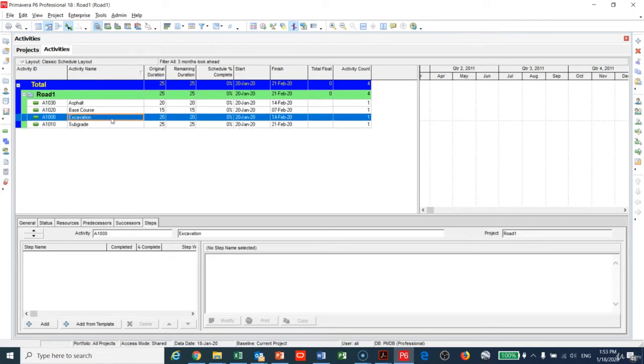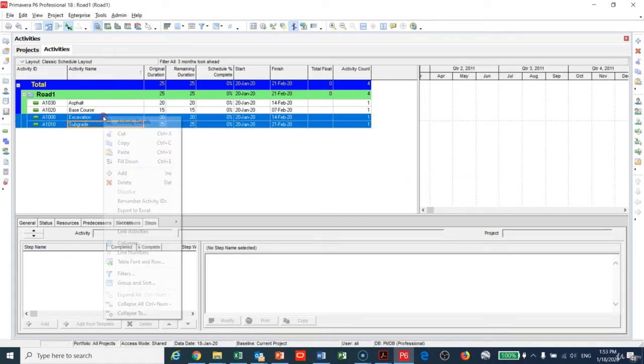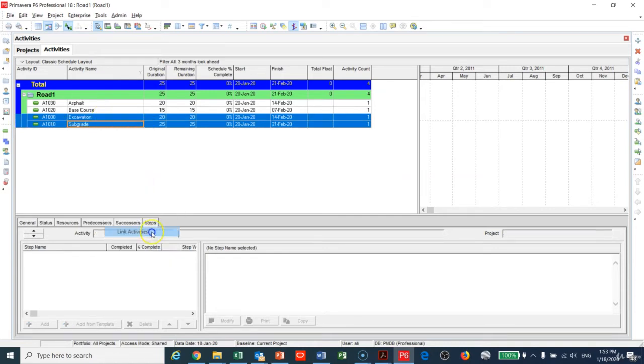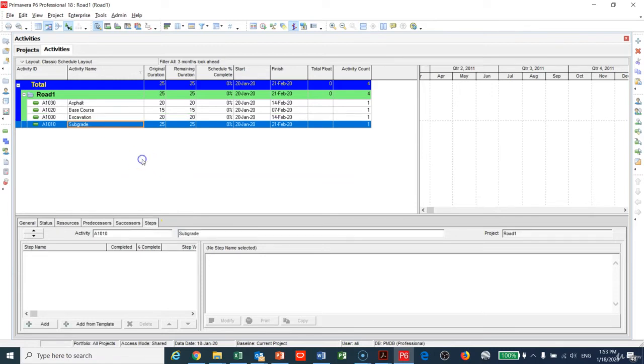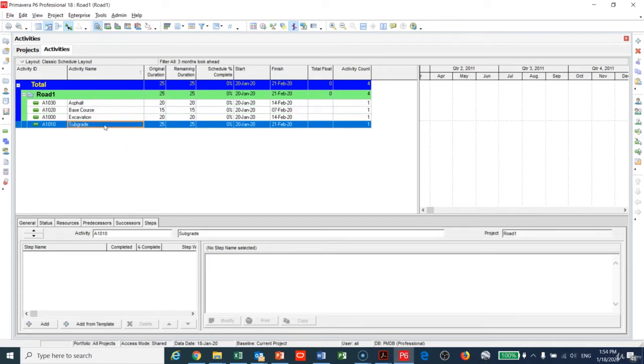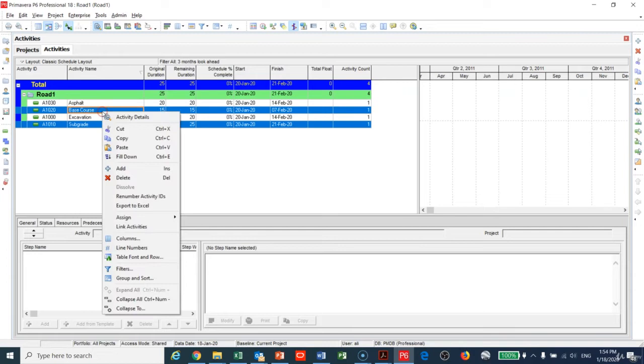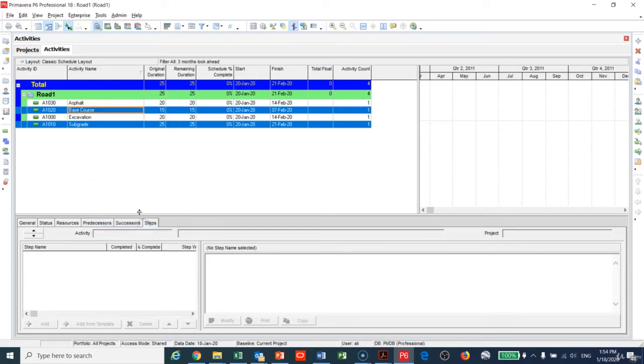I need Excavations first and then Subgrade after. I can highlight these two activities, right-click, and make Link. This way I'm linking the activities in sequence. Then highlight Base Course and Asphalt, right-click, and Link Activities.